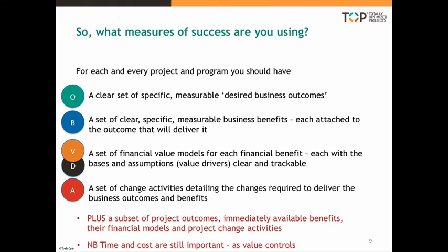Now, one final point. Time and cost are still important, but now as value controls. You're not just trying to get your project to come in on time, on budget, to meet some control factor. Every day you go over the optimum delivery time frame, you have lost a day's benefits. Every dollar you spend over the optimum delivery cost is taking off the net value of the project. So time and cost are still important, but now as value controls contributing to the overall measures of success.